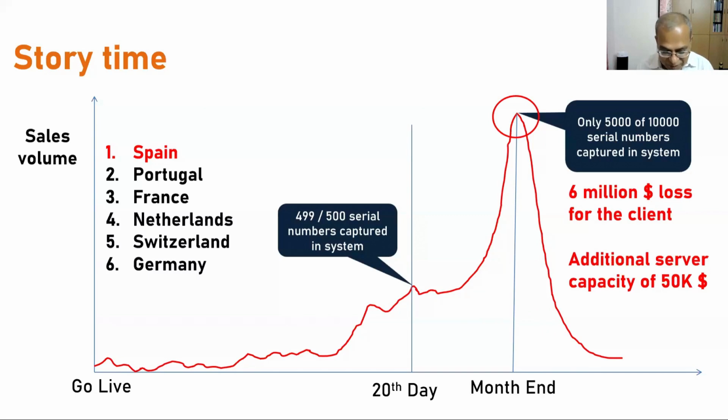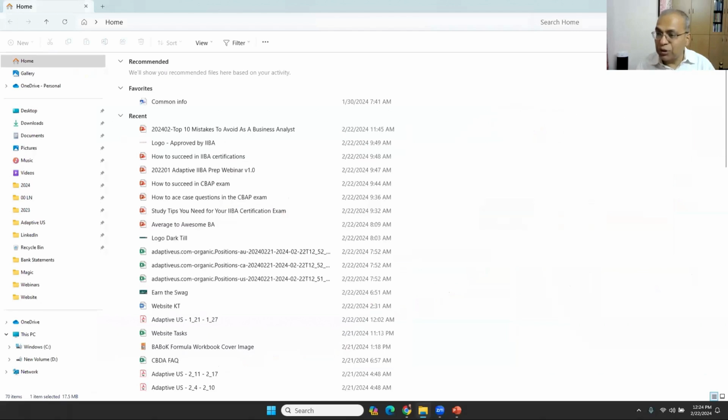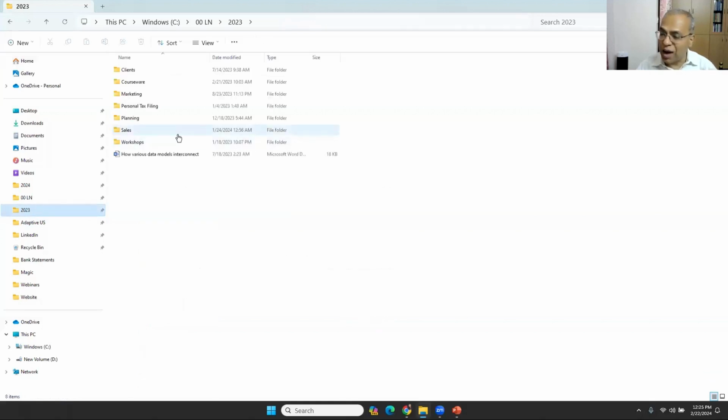So what I learned from this exercise is that it's very important for us to capture non-functional requirements because these are very hard to change. Please remember, people talk about agility, delivering a product in 3 months. These are all good as long as you have figured out your architecture well. If you're just rushing into developing a product without considering non-functional requirements, you're doomed to fail. So please take it from me.